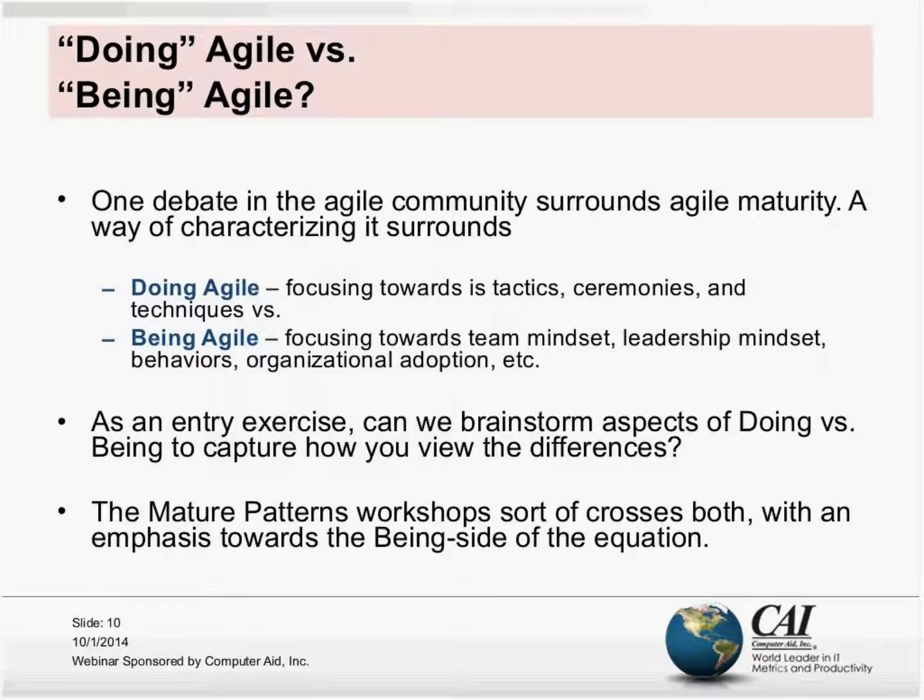In order to illustrate the point, I'll use the daily stand-up. Almost every organization on the planet that says they're Agile does daily stand-ups. It's a very common tactic, so that would be a doing Agile practice. We're having a daily stand-up. It's 15 minutes. We invite people. We answer the 3 questions: What did we do yesterday? What do we plan on doing today? Is there anything in our way? Or some variation of those 3 questions. But we're going through the motions of having a stand-up, and I don't mean that in a bad way. We're having stand-ups, and that's all good.